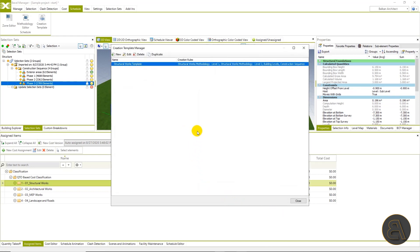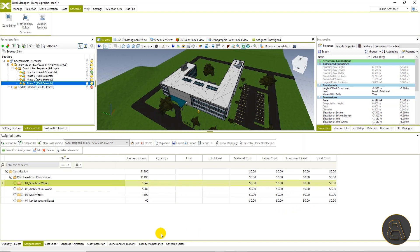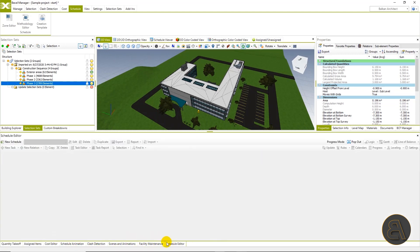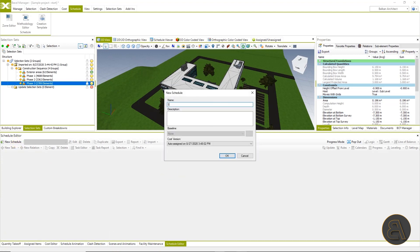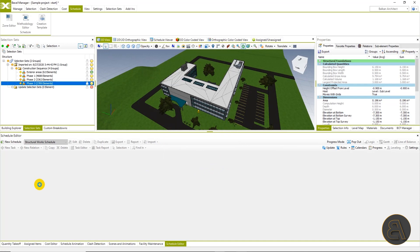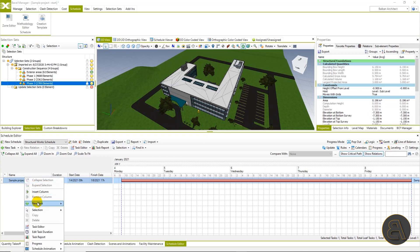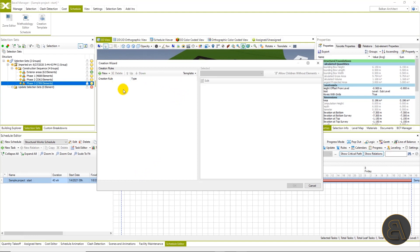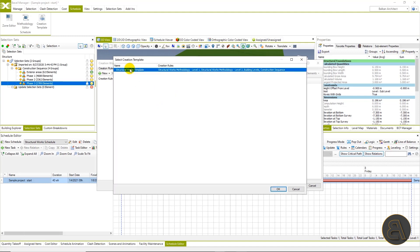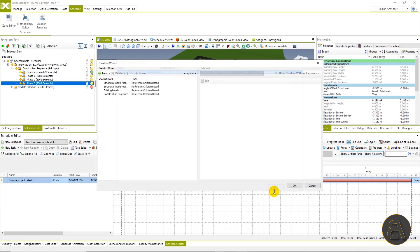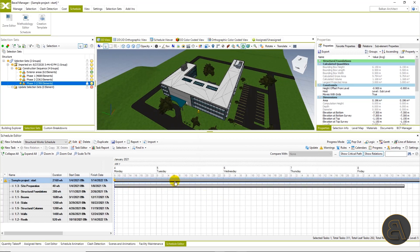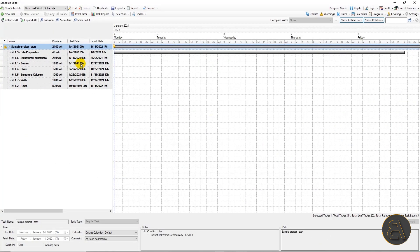Now when we have all three steps completed — zones, methodology, and creation template — we can finally generate our schedule for structural works. Let's go to the schedule editor and create a new schedule called 'structural works schedule'. We can see it has our cost version as reference. Let's make sure we are in Gantt chart view. We'll right-click on the default task and choose new task and then creation wizard. We will use our creation template that we've previously created, and after we click OK our schedule will be generated in a matter of seconds.